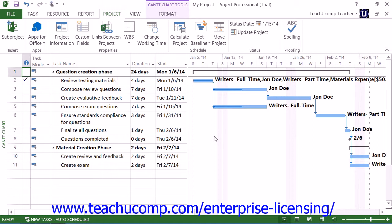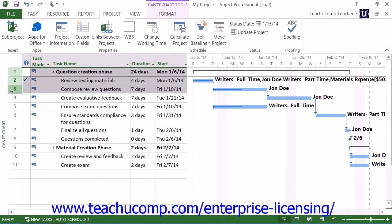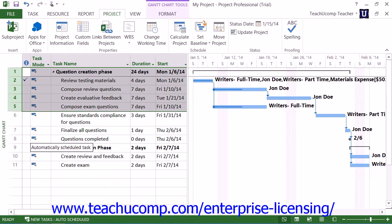Note that if you only wish to update multiple tasks as of a selected date, but not necessarily all the tasks, you can also do that by using the Update Project dialog box. In this case, first select the tasks to update within the Gantt chart view of your project file. Remember, you can select multiple non-adjacent tasks in a list by holding down the CTRL key on your keyboard as you click the individual tasks.